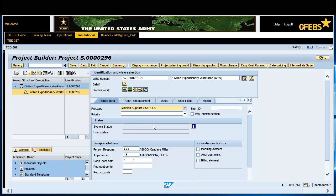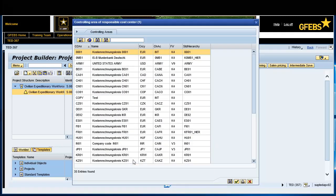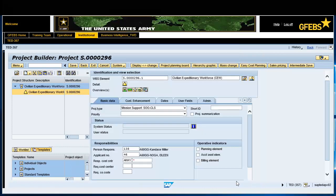In the Responsibilities section, for the Responsible Cost Center, enter Army in the first field. This is the controlling area of the Responsible Cost Center. In the second field, enter the appropriate cost center. This is the cost center for the Responsible Performing Organization.